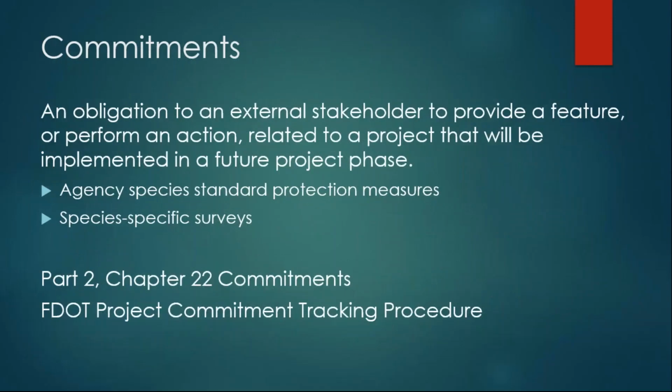And commitments are those obligations to an external stakeholder to provide a feature or perform an action related to a project that will be implemented in a future project phase. Some things that are commitments would be agency species standard protection measures, which are very common for us to include as a commitment.